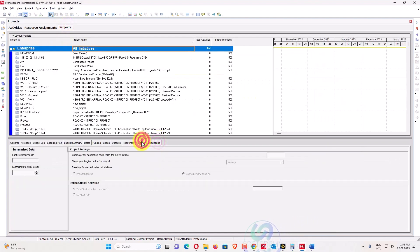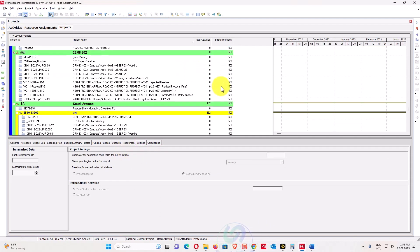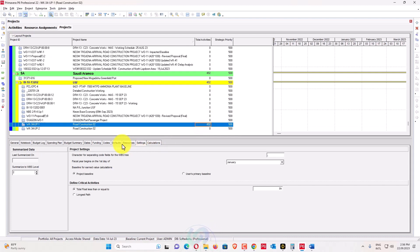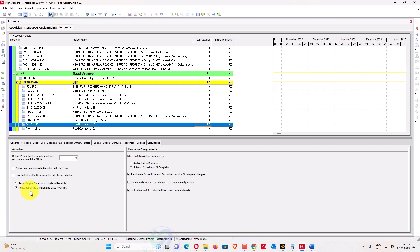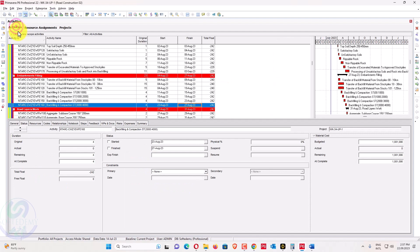The most important setting is in the project Calculations tab. You must select the project and reset remaining duration and units to original. This ensures that the remaining duration equals the original duration. There is one more limitation I want to explain so you don't have to ask in the comments. Also, my WhatsApp number is in the video description — feel free to contact me for questions not already covered in my videos.